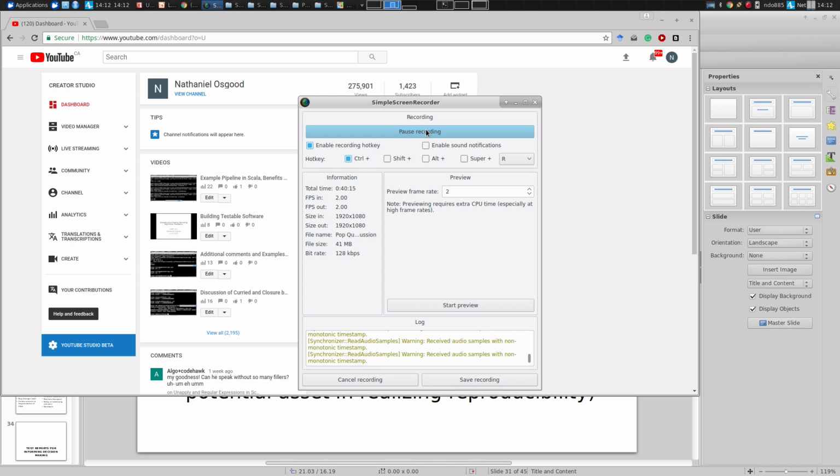It turns out quality is something, if you sacrifice it, you're going to have a hard time keeping the ship together. You're going to lose developers. Time to delivery will often stretch out because you can't stay on top of the bugs, or you're going to have a very disappointed stakeholder because you're not able to match up to their level of satisfaction with the implementation of the requirements. And because the project takes longer, the dollars will take longer.